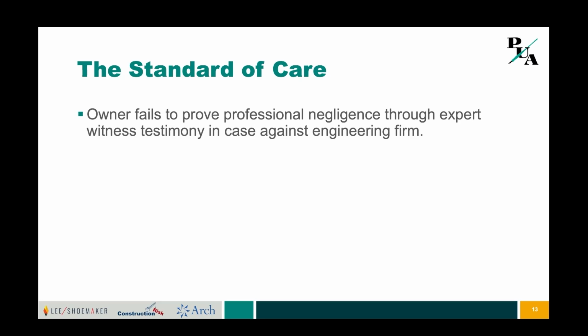The purchaser closed on the acquisition of the property and subsequently discovered that additional water supply and pipes would have to be installed, and then ultimately sued the engineer for those additional costs, in essence saying, I overpaid for the property because I would have accounted for those additional costs, or perhaps not even acquired the property had you accurately advised me when I was conducting due diligence. The purchaser had three experts who testified, but none of them were able to offer a standard of care opinion to testify affirmatively that the engineer had breached the standard of care.